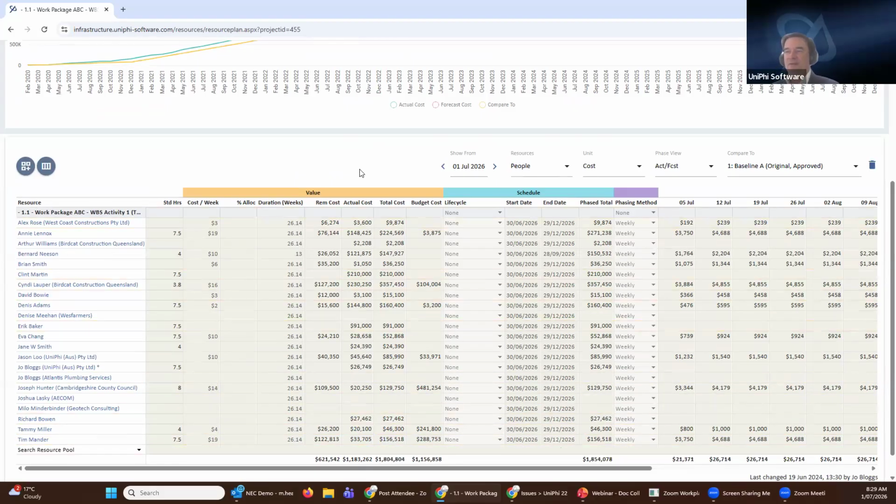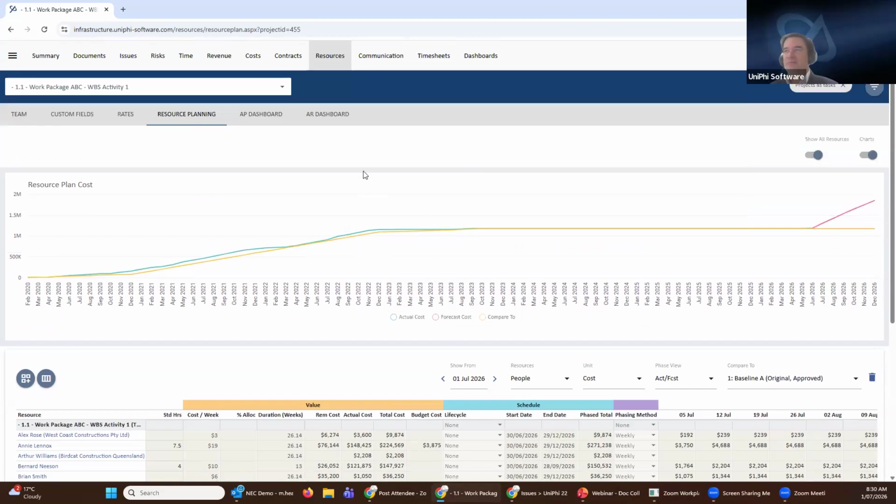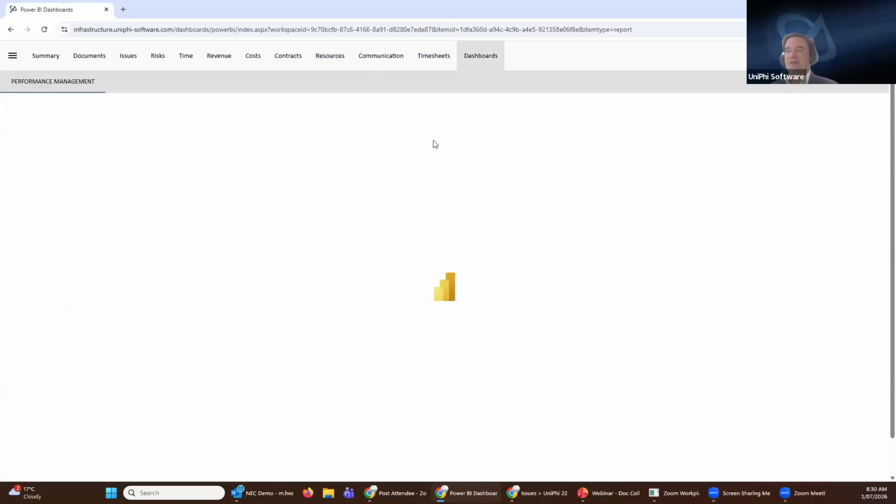So what we've got in this particular screen is the updating of the actual cost of work performed, which is the cost metric, the budgeted cost of work scheduled, which is the baseline metric when I snapshot the baseline. And then the performance metric is coming from a combination of that baseline and how much we've progressed from the time dashboard. And that then leads us back to the original dashboard performance that we had at the start of the session.